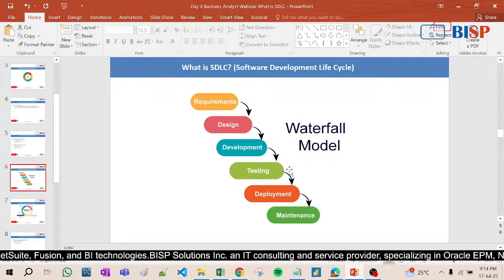Okay, now once the deployment and maintenance are done, suppose at the testing point the client again says, okay, we have changed the requirement. This is not allowed in the waterfall model. That is why it is called the waterfall model. That means in one attempt you give your requirement, they freeze it, give me the sign off, then we finalize the template. It is largely used for website development and mobile application development. This waterfall model is used because it's suitable for this type of project, right?